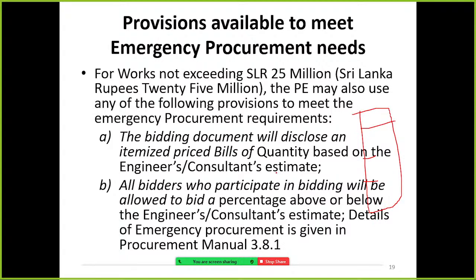In those cases, the engineers independently draft a bill of quantity, the cost estimates. Based on these cost estimates, they can proceed with the emergency procurement.